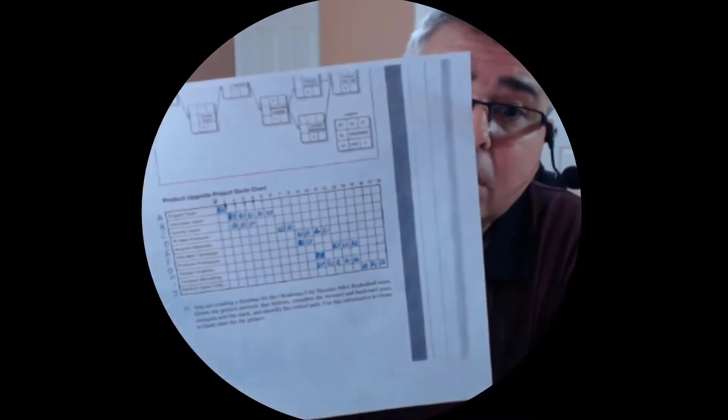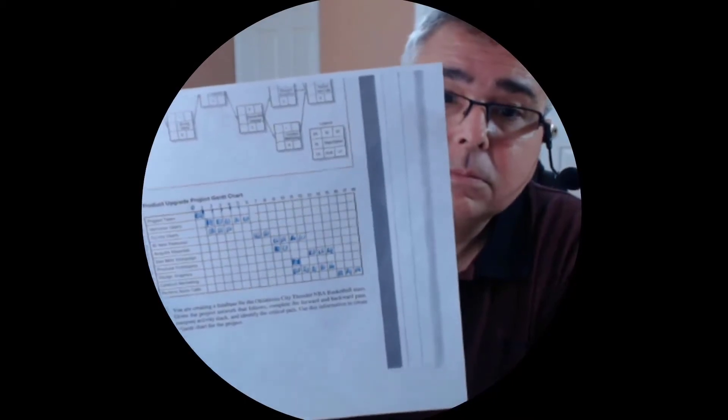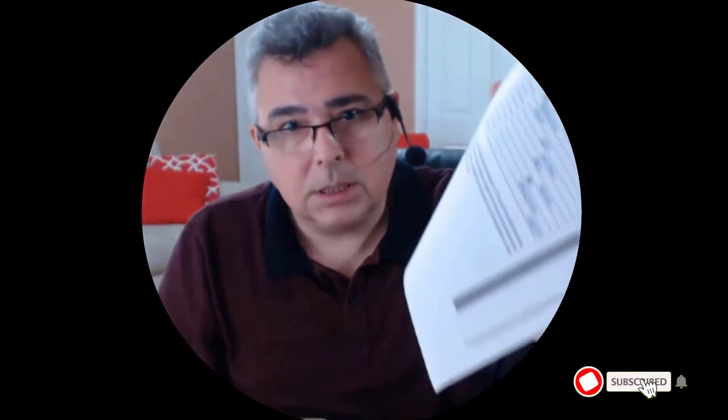Can you see? So what we just did: we went to the network, we computed the times. After computing the times, we transfer the early start and the early finish to the Gantt chart. And that is the Gantt chart. That is the project schedule.